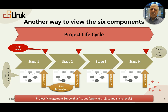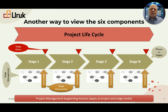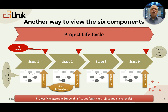The standard model includes an early discovery phase and an operational aspect. Between stages seven and nine, we call it PLC closure — we are closing the Project Life Cycle at gate nine, but that doesn't mean the project is closed. In the Rook platform, projects move through a categorized list: future project, active project, and once we reach gate nine, the completed project list. The project is complete, but not yet closed.